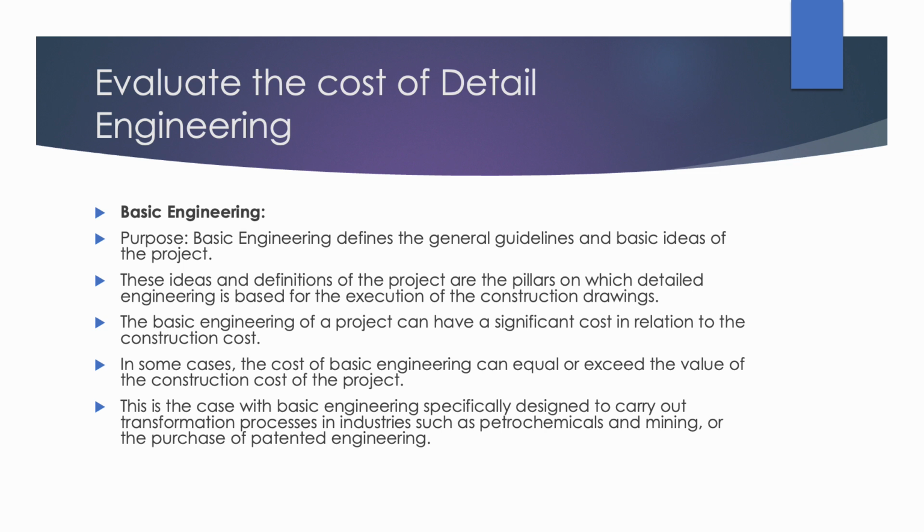In some cases, the cost of basic engineering can equal or exceed the value of the construction cost of the project. This is the case with basic engineering, specifically designed to carry out transformation processes in industries such as petrochemicals and mining, or the purchase of patented engineering.